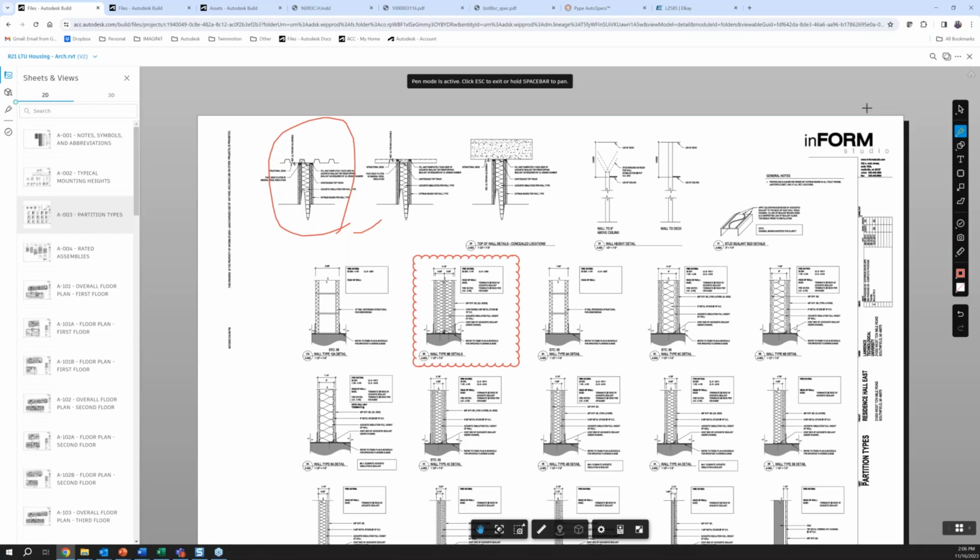So maybe at 200, we don't know, we haven't spec'd it out, but as you're going through your construction documentation, like traditional means, you're writing your spec as you're approaching CD, you should be assigning that specification to the objects that you're designing and documenting. So it's somewhere in that phase.